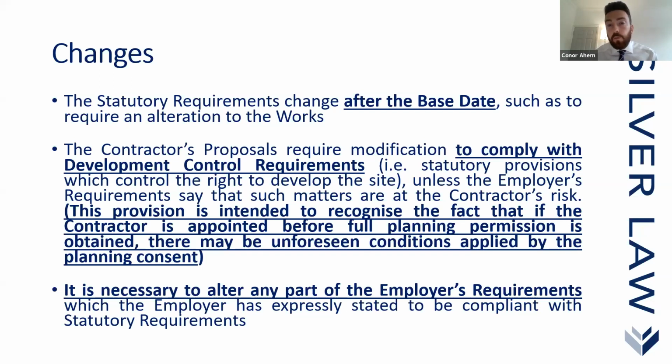It's actually important just to understand that base date, especially lately in relation to statute changes such as Brexit, where there have been statutory amendments. So you really want to be careful about what base date is included. The employer will want to backdate the base date as much as possible. Obviously, from the contractor's point of view, the closer it is to the start on site, the better.